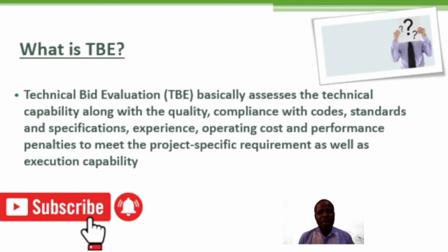So during technical bid evaluation, you assess the technical capability, along with the quality, along with the vendor compliance with the respective codes governing the basic designs of the equipment. You also check compliance with standards and specifications governing the basic designs of the equipment.